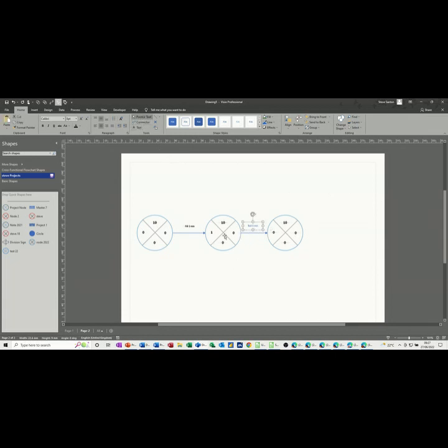Now while that's happening, so that's now 1 plus 5, so this needs to be a 6. So that's taken 6 minutes so far. I'll change the font on this later on. But now while it's boiling, this is where you can have other things going on. So I want a shape to come out of this shape and then reconnect back into there. I haven't numbered these, so this needs to be 20.